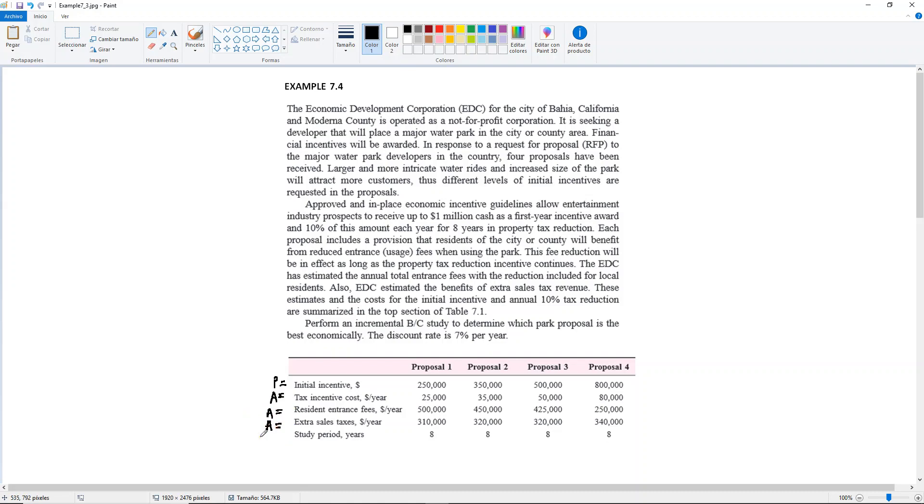But the difference here is that if you read carefully, because these are not costs, it only says fees and taxes, so we cannot say that this is an annual cost.